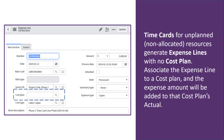Timecards for unplanned or unallocated resources generate expense lines with no cost plan. Since the expense line can't find a resource plan for that user, it can't determine the cost plan, so it leaves it empty. If you associate that expense line to an existing cost plan, the expense line's total amount will be added to the cost plan's actuals when the state of the expense line switches to processed.